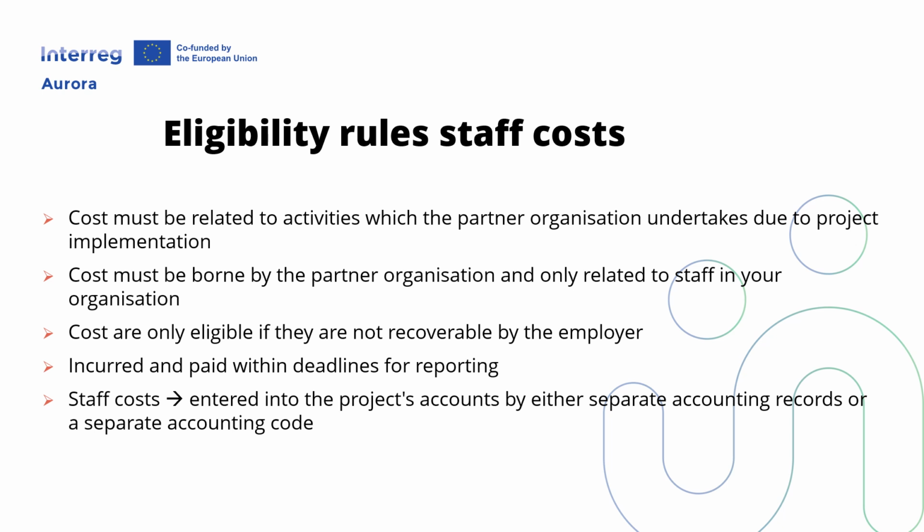And important, the staff costs need to be entered into a separate accounting code. This is according to the regulation, so if staff costs aren't booked in a separate accounting code in your bookkeeping, they are not eligible.